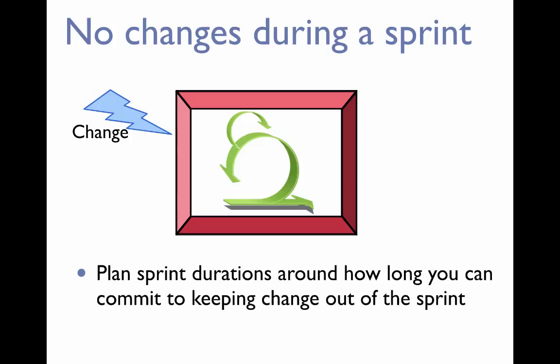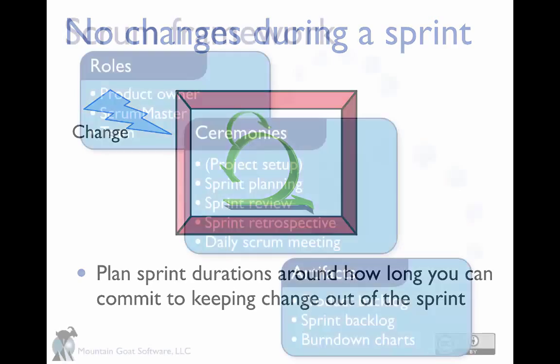Second important thing about a sprint is there are no changes introduced during the sprint. At the beginning of a sprint, you set out what to do. You do that, you ship the new part, and only then at the end of it do you look at it and say, does it work? Does it not work? Should we change anything about that? Okay, so that's the quick overview.